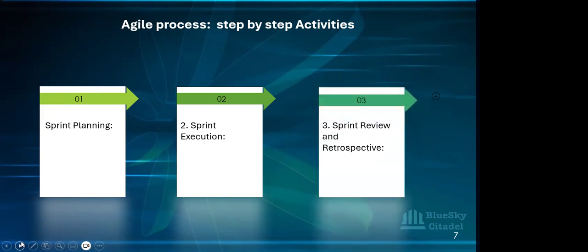And then one of the other things that happens within the sprint execution is the sprint review and retrospective, which I also believe you guys have had, because you're in sprint 2 now. So in the review, you look at the work that has been done, or executed, within that sprint, where you get feedback from your stakeholders. And then in the retrospective, you look at yourselves within the team and reflect on what has gone well and what can be improved. So you can see how that differs a lot from Waterfall.